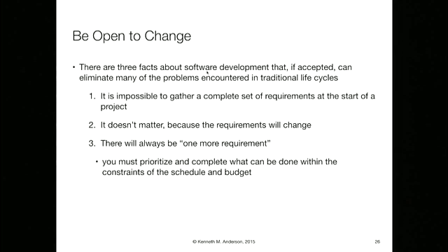Agile says, basically, if you've got a story that you say can't be done in the next 3 days or within a week, then you probably don't understand enough about the story, right? And you're just guessing anyway. So we're really good at saying, yeah, I can get this done this week, no problem. We're less good about saying, I can get this done this month. And we're horrible at anything else beyond that. Basically, Agile just says, well, let's get out of that context. Let's not try to predict what we're going to do 6 months from now. Let's predict what we're going to do in 2 weeks. We're much better at that.